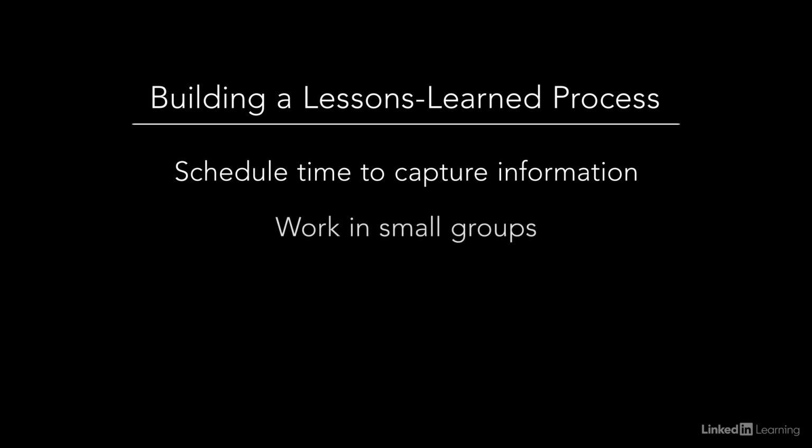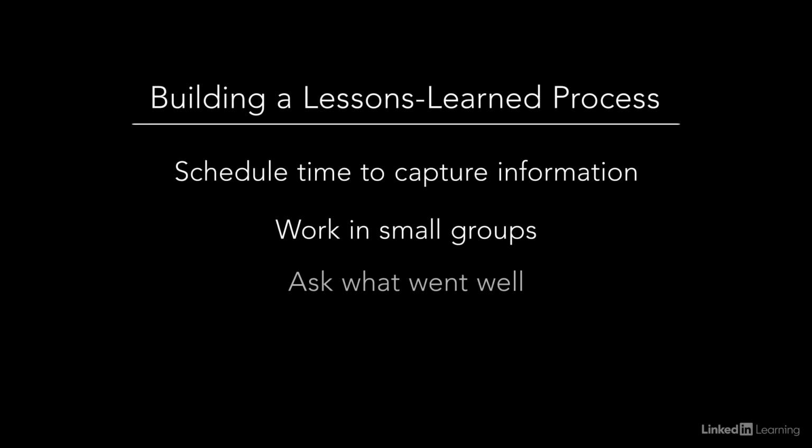So you gather groups of maybe 5 or 10 people, and then you start by reflecting on what they set out to do and what they actually accomplished. Based on those two questions, then you start asking, for example, what went well? And in the case of Airbus, they would sit down and say, well, what went well in the Airbus 340, for example? And based on that, copy that and mirror that